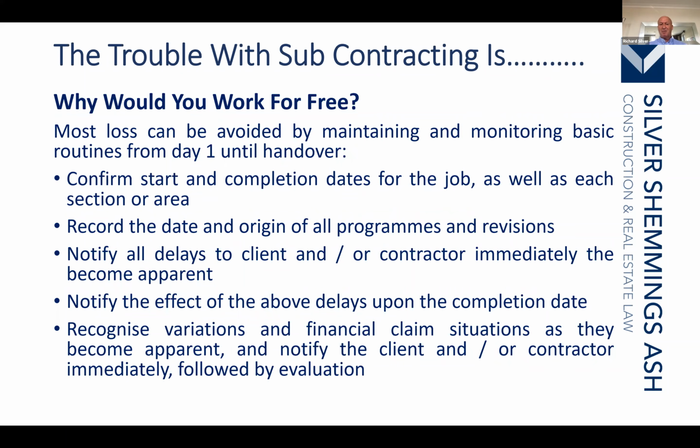As far as subcontracting is concerned, the main thing, as I've identified before, is record keeping. Make sure you follow some of these very simple things. Make sure you apply for the works, application for payments on the proper dates with full and proper particulars. The more you're up to speed and issue the information to the contractor, more able they are to issue it up the line and hence get payment, and then they'll pay you. Whether you're entitled to the money is not always relevant. It's whether the contractor can recover that money themselves that creates the dispute.